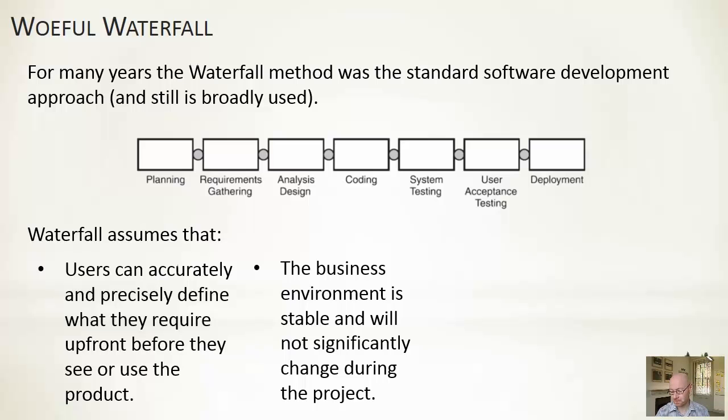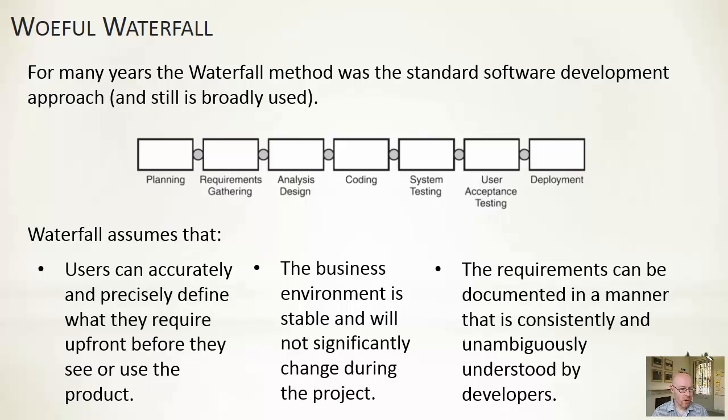And the final problematic assumption here is that in the early phases, the planning and requirements gathering, that's when I, as a client, am involved in the process, and we have an analyst who's talking to me, trying to tease out what exactly it is that I want. And there's an assumption here that you can capture what I want, quite often in terms of written documentation. And this written documentation can then be handed off to coders and to testers, and from that, they can precisely recreate what it is that I tried to communicate initially.